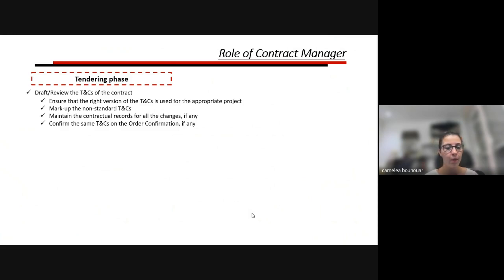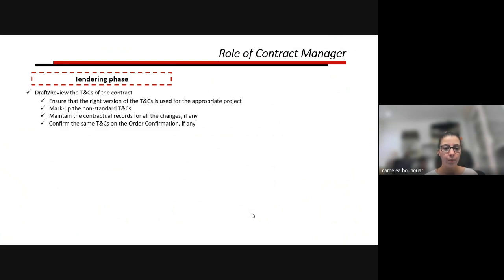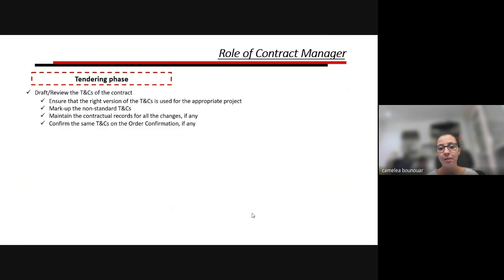It's very important to confirm the agreed T&Cs in the order confirmation. During the tender or bid phase we take time to negotiate the right T&Cs, but sometimes we receive a purchase order with completely different T&Cs — not because the other party ignored prior negotiations, but because their system issues their own T&Cs by default. So issuing an order confirmation ensures all persons are on the right page.